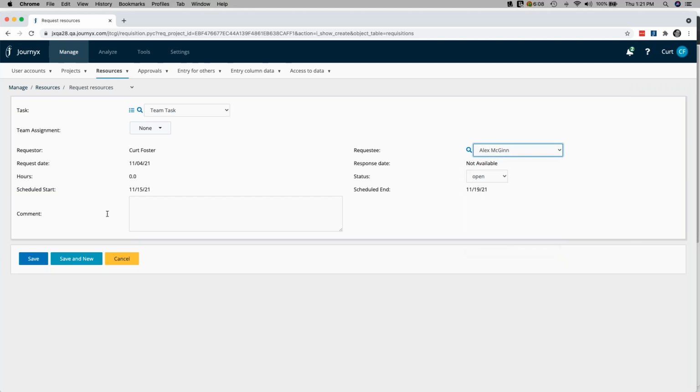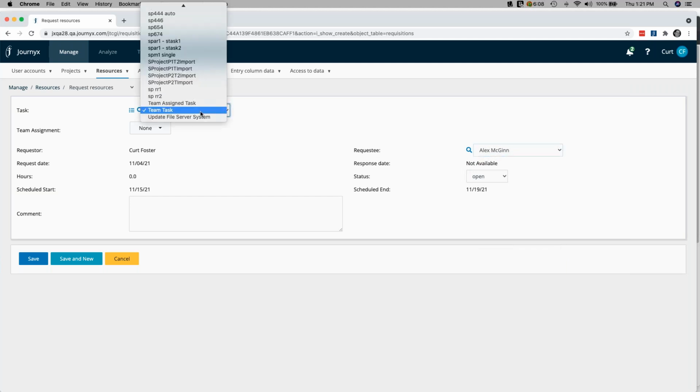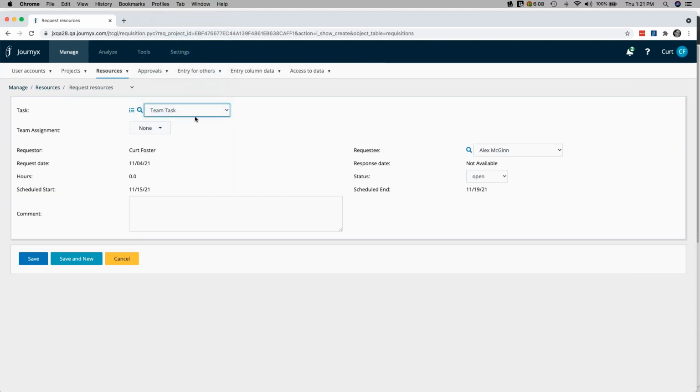But prior to 12.5, the Opus release, you could not open resource requisitions for tasks that had team assignments. Only completely unassigned tasks were open for this resource requisition functionality. So now you can pass along team assignments. And as I mentioned, if we had 2 team assignments, so if this task was split between 2 teams, I could send one team assignment to one resource manager and another to a second resource manager. So a lot more flexibility there when you as the project manager need others to make your resource assignments for you.